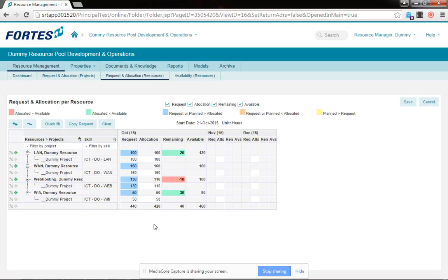So Jasper, how does this remaining 10, which is shown in red, minus 10, work out? I mean, if after the discussion, the resource says he can work max of 100 hours, then the resource manager reduces this 110 to 100? Yes. Let's say the resource says, no, I'm working 100, period. Okay. Then I just wanted to show that you have green, then still remaining, and red, then you're over